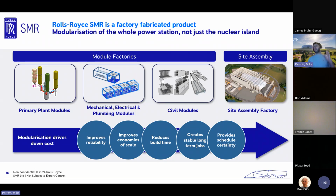Another benefit is that with the modules, they can go through an initial test in a factory environment. You can do an electrical test on an actuator for a valve, as an example, to make sure it's receiving signal, make sure it's moving, make sure it's getting the right signals in and out. Do these cable lengths reach? Can we do an air test to make sure it's initially holding pressure before you get to site and do its hydrostatic testing? So again, that has huge benefits, in particular risk reduction, so that you're not getting to site and realizing that you've got an electrical fault. You may still have those, but you're less likely to have as many at site, and you can do flow tests and things like that.